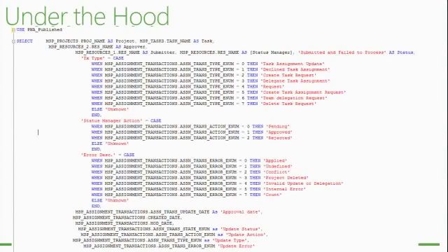It's mostly the case that these are regular assignment updates, task updates that would be inputted into the task view as an update to an assignment. So you will see a lot of these. And then you will have other types of values in there. Another one is a declined task assignment. Another one is a create task request. You remember that you can allow a user to create their own task, right? It's an option. If you have a delegation of a task assignment, it will show up as number 3. And a create task assignment request, team delegation.